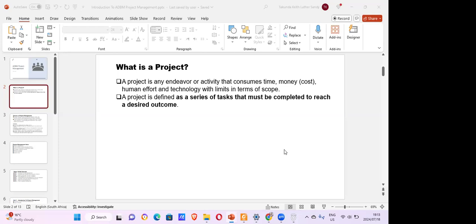It's fine. So from there now, if this organization, the DATSA, they've made a new car, and that car has met all the requirements that they were looking at, so they've done a project. But if now they say we need to do mass production of that car, we need to make sales from that car. They start producing it in masses, maybe 5,000 or 10,000 after every 2 weeks. That ceases to become a project. It now becomes what is called an operation, or a day-to-day what?